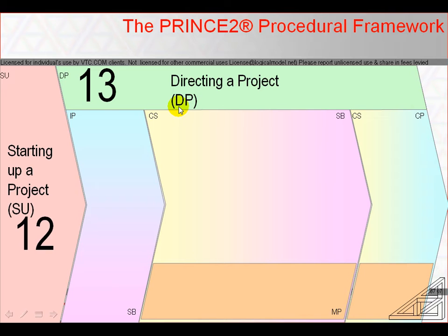Appendix A, document templates 8 and 9. The project board also examine new stage plans and revised project plans, both covered by template 16. The project board reviews the business case, template 2. They review revised risk profiles, template 25, and also organisation charts and other factors which have no template. The first significant decision of the project board is the activity to authorise initiation, which occurs between the starting up a project process and the initiation stage.